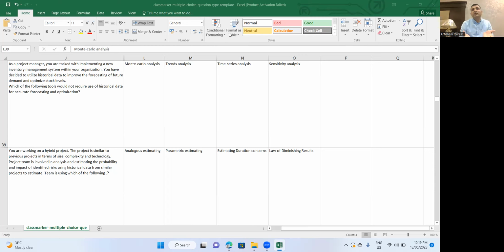So when there is uncertainty in the estimates, take all these estimates and pass them through Monte Carlo analysis. It will do summation, some permutation, and give you a result. It will tell you the combined impact of all these risk events on your outcome.